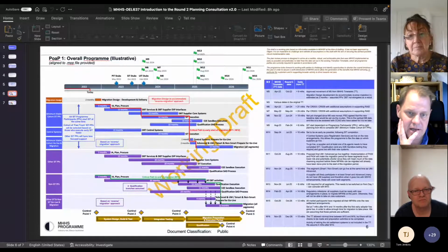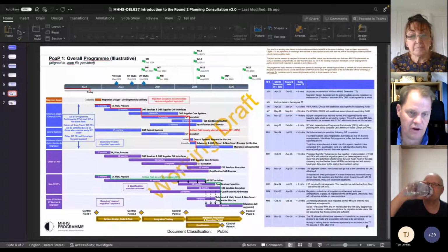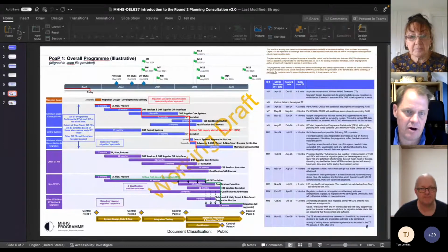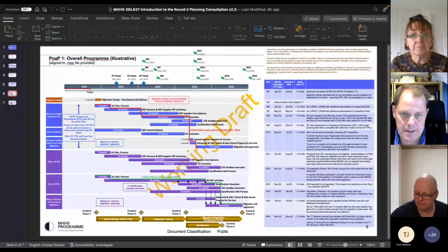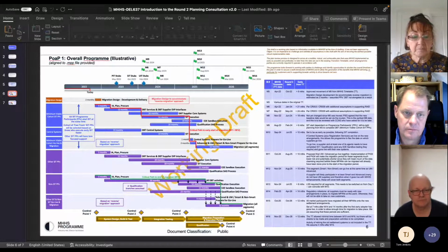But the assumption is that DIP will be ready as one of those central systems in that middle royal blue row, and that is currently on target with the procurement activities as they are at the moment, and the expected implementation timelines from DIP bidders. I think it's good to call them out individually because they are on the critical path, aren't they? And any one of those central system failings pushes out your timelines, doesn't it? So I think that's the point of putting it onto the front high level helicopter plan. Yeah, we stated it in the RAID document. We stated that as a clear assumption, of course.